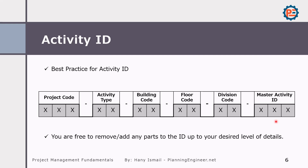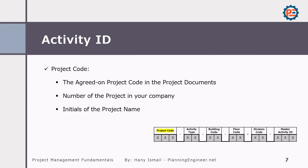I'll explain each section. For the project code, you can assign three digits for all your projects, so once you read any schedule, you can easily recognize which project we are talking about — the project number in your company, initial project name, or whatever characters you choose, fixed up to three digits and used efficiently. The second portion is the activity type.